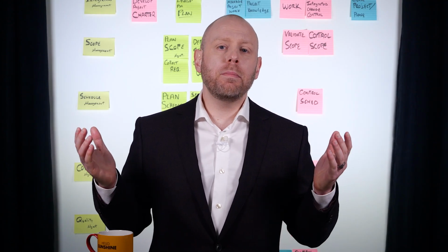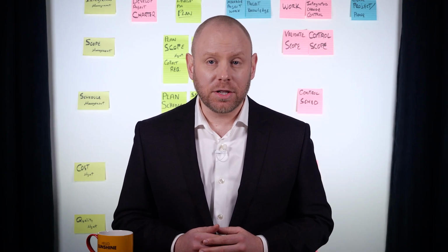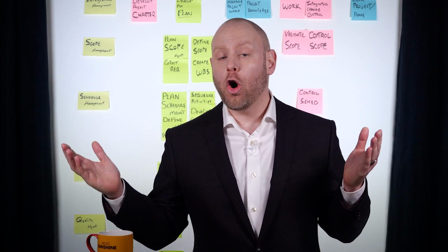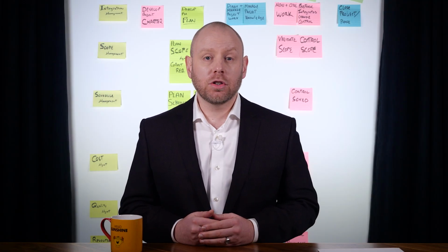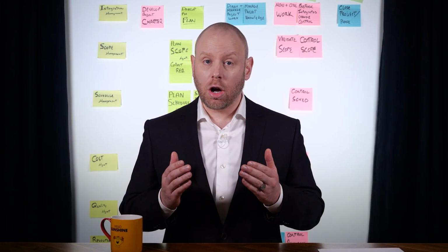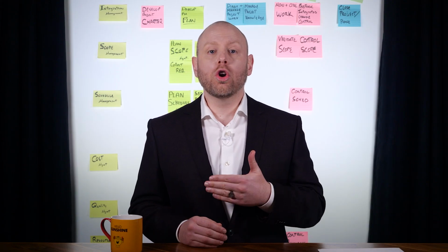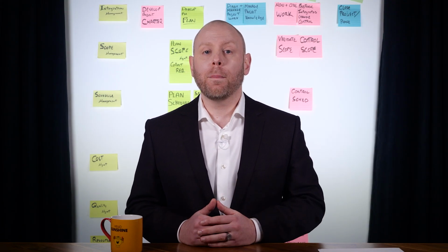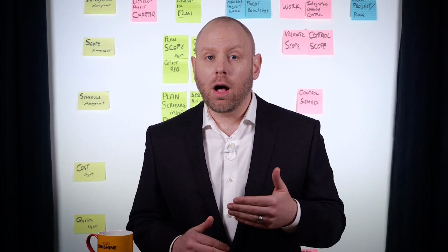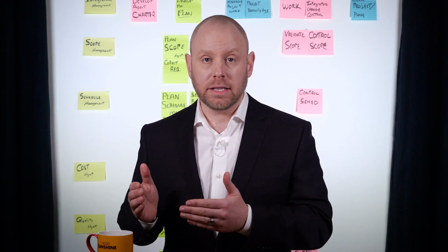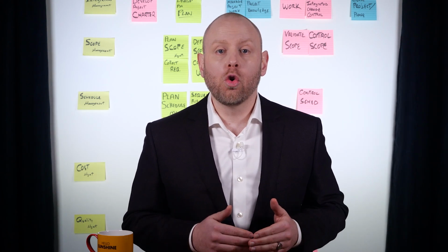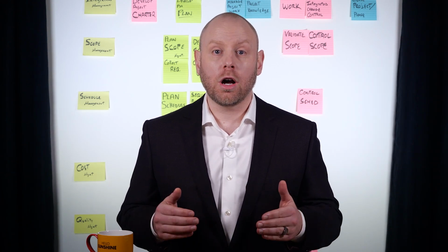Of course, we wouldn't be able to talk about inputs without our best friends forever, EEFs and OPAs. In this case, EEFs could be our stakeholders' risk tolerances, established mediums of communication, or global and regional trends or practices. OPAs could include policies and procedures around risk, internal communication, or reporting requirements or software tools.